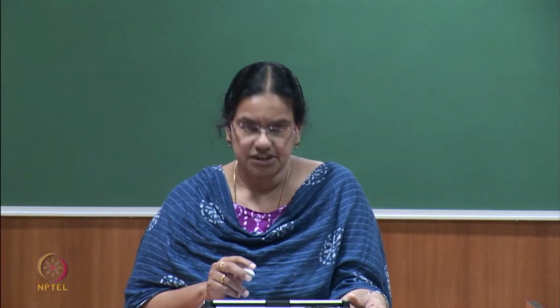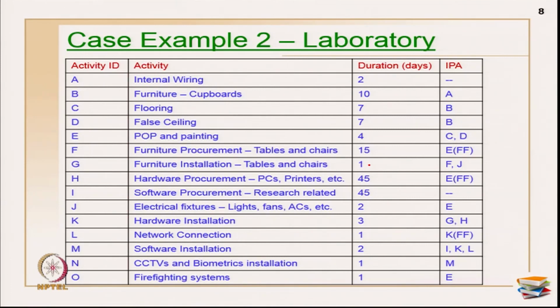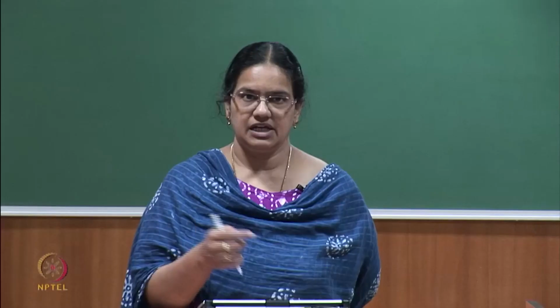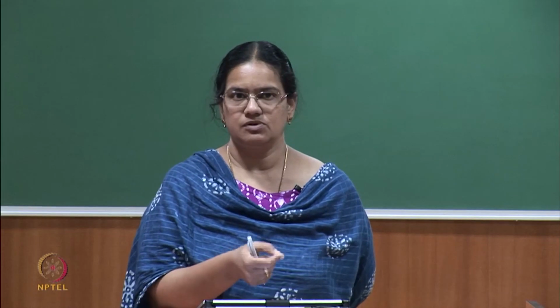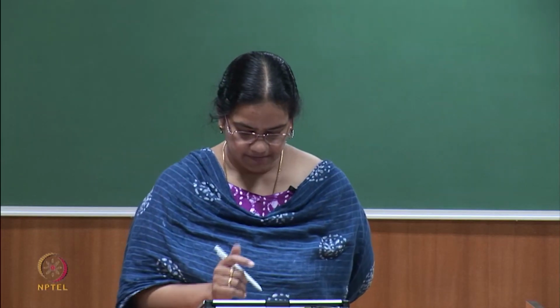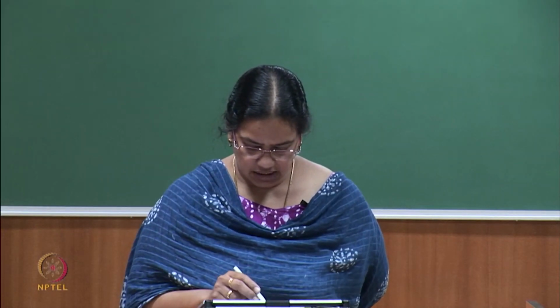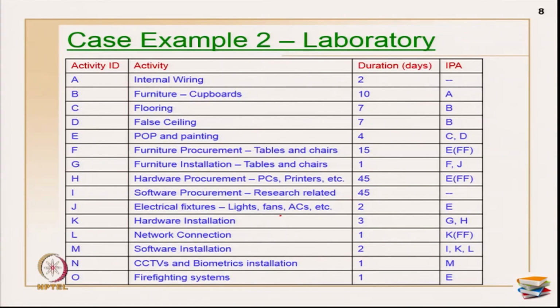The next installation, primarily the customizing and assembling of the tables and chairs, was planned. That actually has a predecessor in procurement, and also the electrical fixtures, because the tables can't be moved, since we need power points for all the tables, because we are planning to use a computer there. So, that is where we had a link with the predecessors with the electrical fixtures.